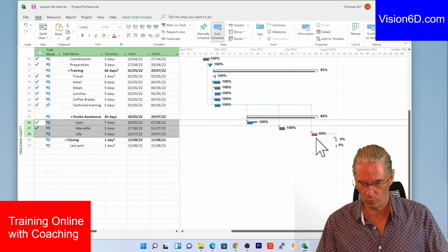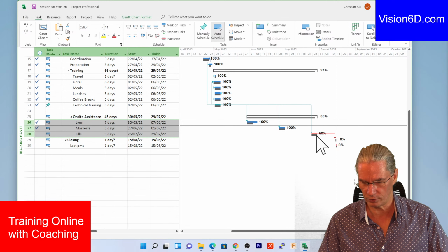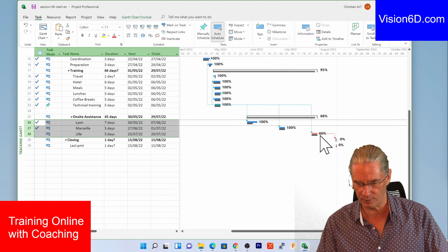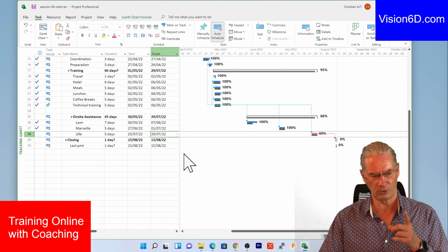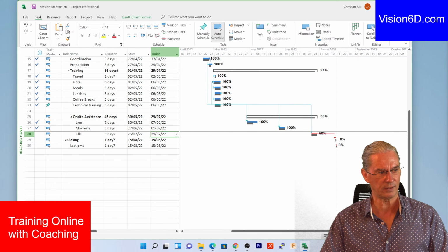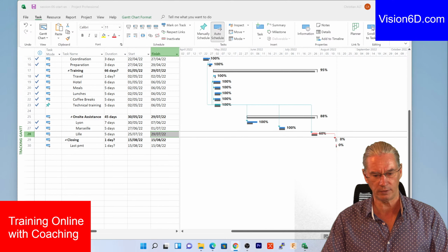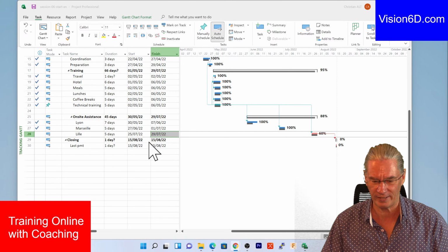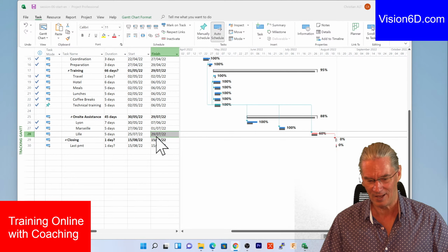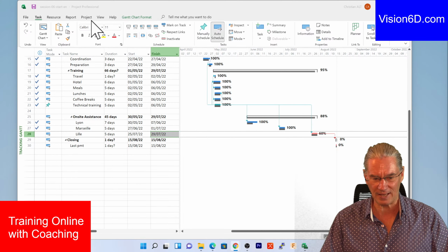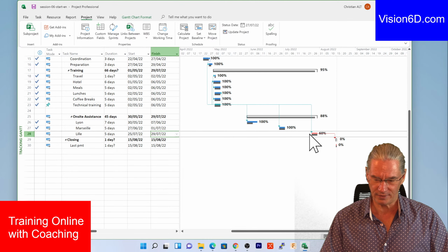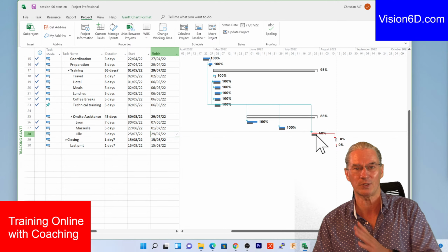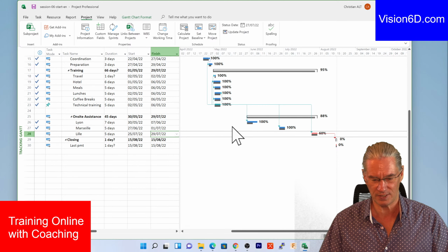So this was done. I have just a question mark here. Why does it say 60%? Oh, I understand. Do you also know why I have 60% here and not 100%? Yes, of course, you know, I made a mistake on the dates. My status date stands on the 27th, and it was in the middle of this intervention, at 60% of this intervention. So this is my mistake.